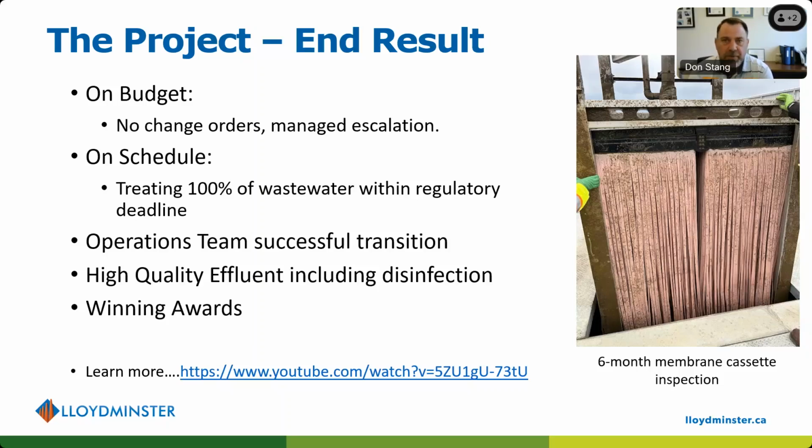We also had a couple of owner directives, and owner directives are instructions to the project team to either build or delete items. But as far as change orders, we didn't have a GC contractor coming to say, well, engineers, you designed this improperly, here's a change order to fix that problem.